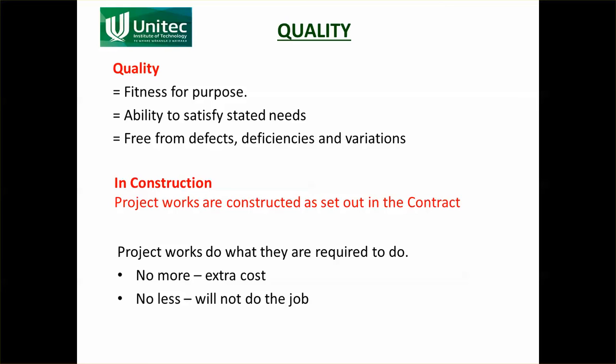Is that okay? The client or the designer will look at what their needs are, and they'll say yes, it is. Remember, the consultant, the designer, is working for the client. So he'll say yes, it looks okay, and recommend that the client accepts it, and the client says yes, that's okay. So the design in the contract documents can be changed with the designer, the client and the contractor all working together, and often is. But in construction, it is as set out in the contract document, or if you've agreed a variation, what that variation actually is.